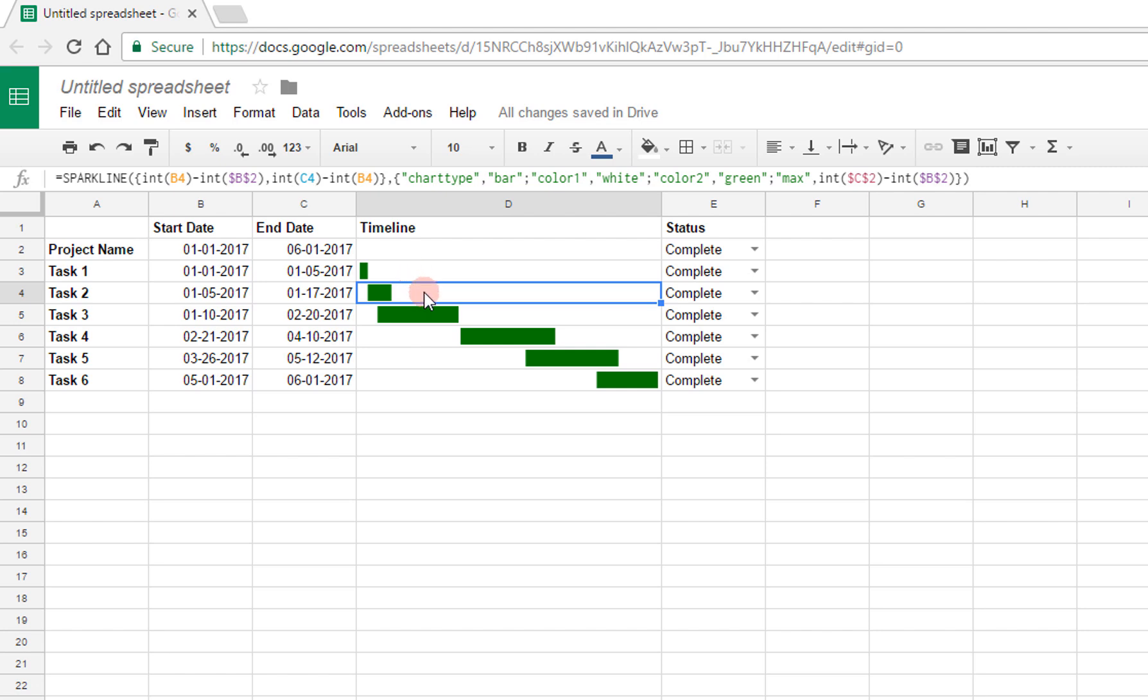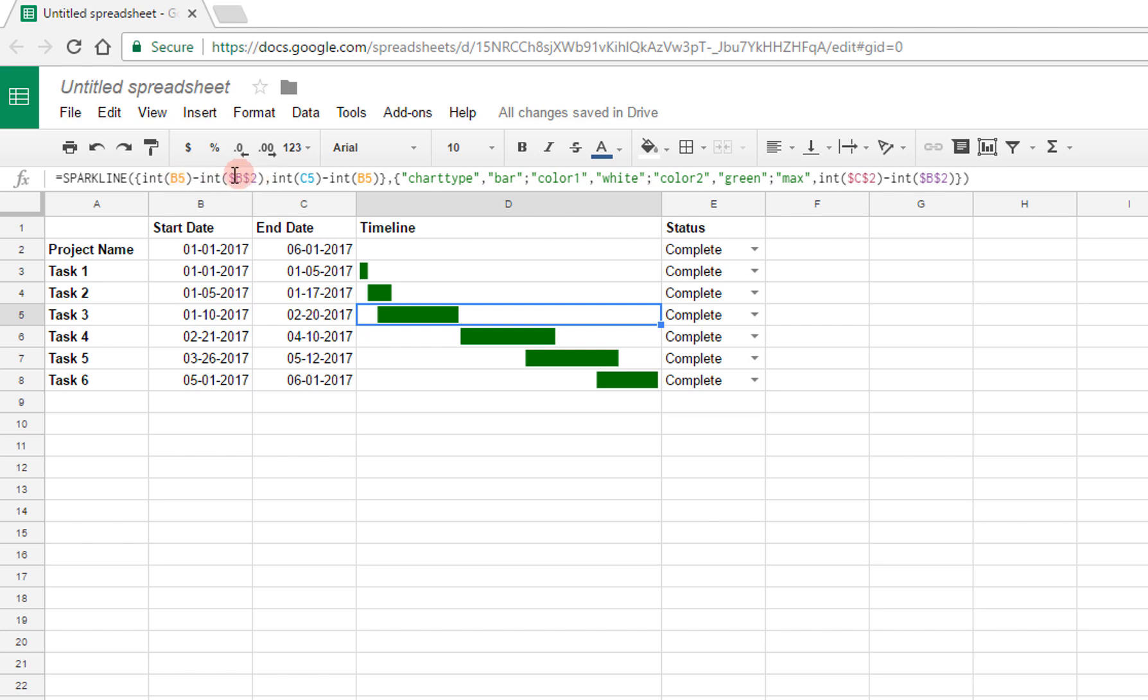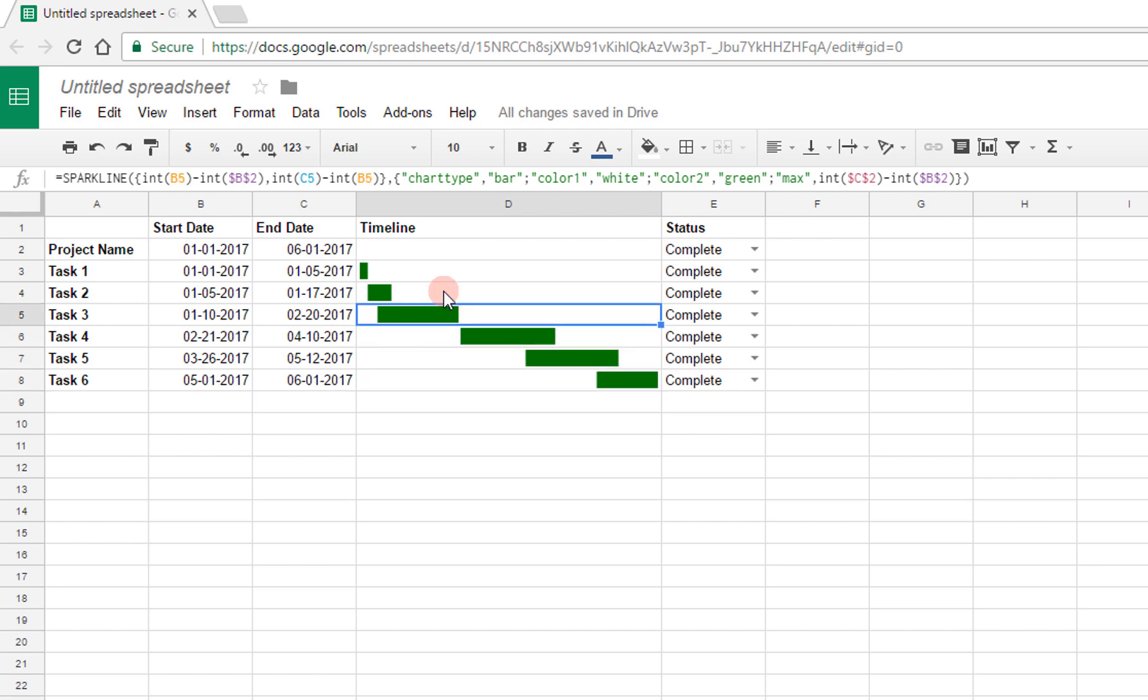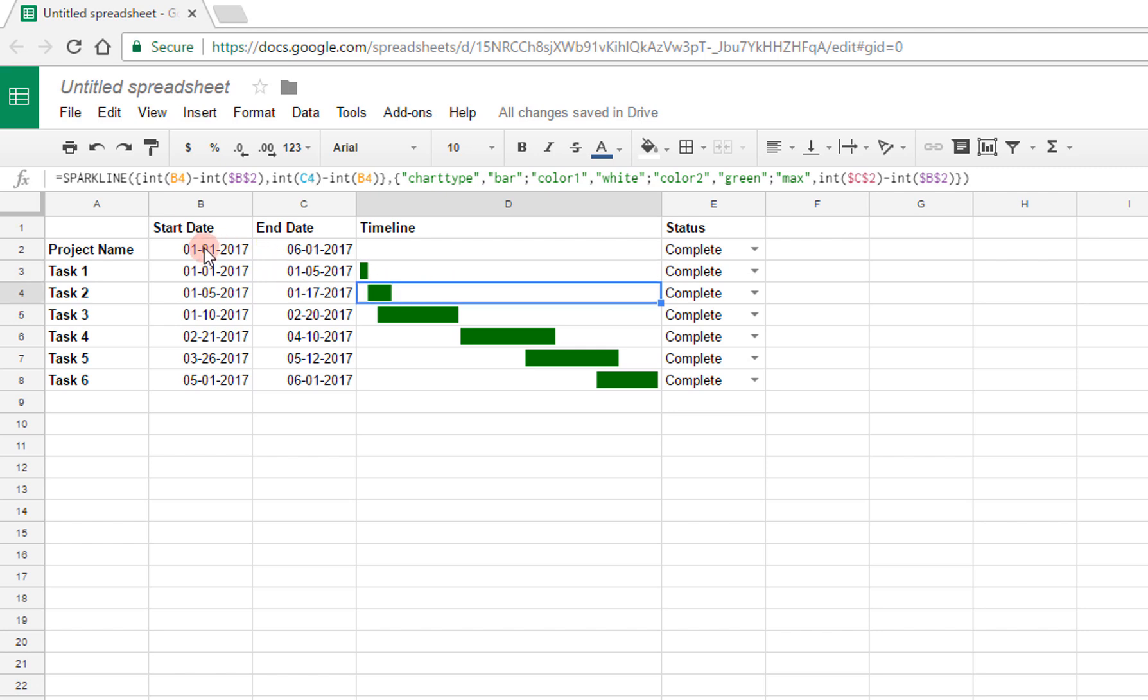Now as far as the propagation that I was talking about, notice that I had typed int of $b$2. If I look at the next one, it becomes int of $b$2, and the key here is that the whole $b$2, the dollar sign makes it stay constant regardless of your propagation. And so while those other values changed dynamically, the ones that were referenced with the dollar sign stay fixed. And that's important because we always want to reference the same start and end dates of the entire project.